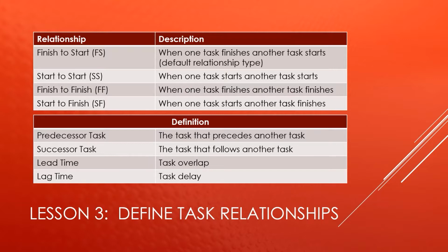You also have finish to finish. When one task finishes, another task finishes, so you need them to finish at the same date. And finally, you have start to finish. This one is infrequently used. When one task starts, another task finishes. So you want a task to start and another task to finish at the same time.